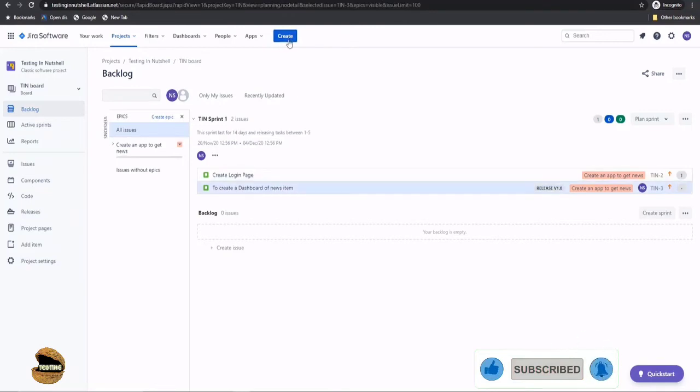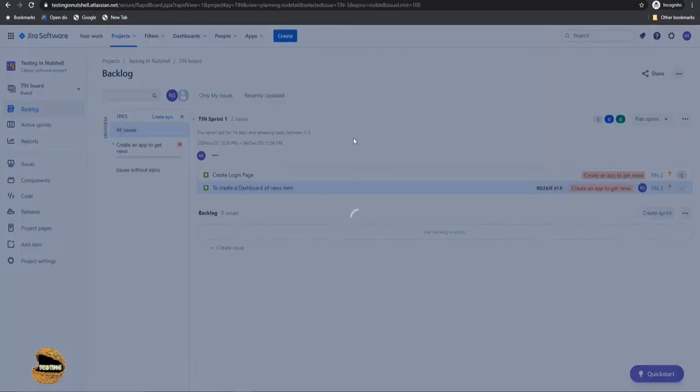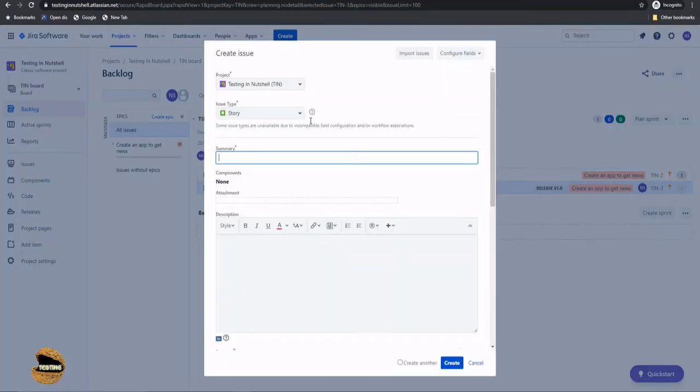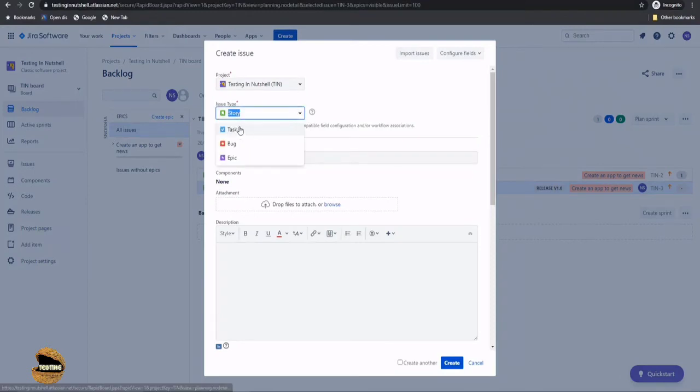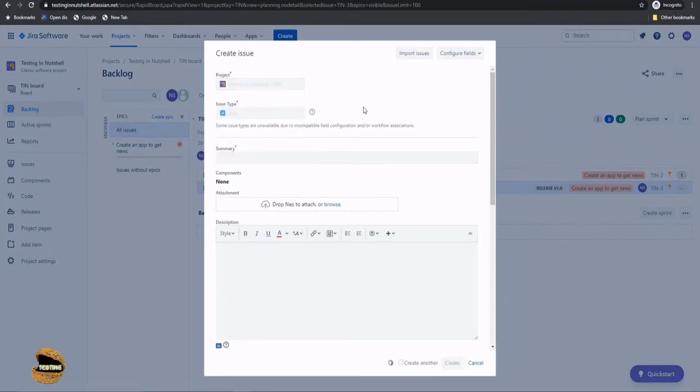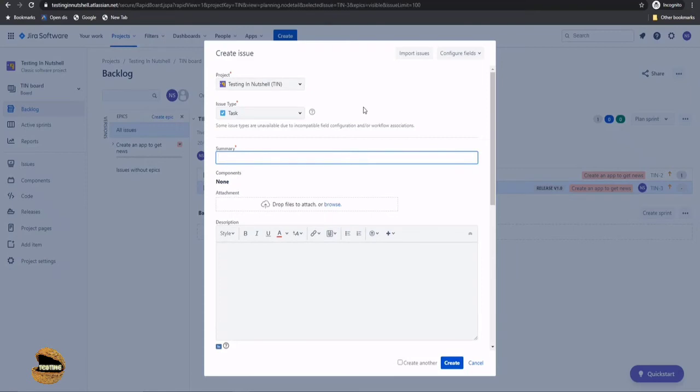Now, similarly, when you want to create tasks or you want to create a different work item, you can make use of the same button. That is to click on create. And instead of selecting user story, you will select the task. So task is a subset of user story, where user story is a subset of epic. And task is just like breaking down a user story into very simpler forms which could be executed at any point of time.